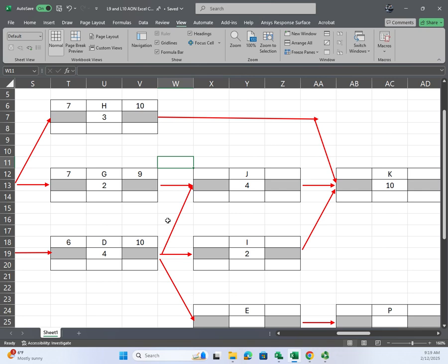And if there's two predecessors, you've got to go with the longest time. What it's going to do for us is give us a little bit of room with G to float by a week, one way or the other. So right now our early start here is 10, and then we've got 14, right? What about I? It's 10 also, and then 12.